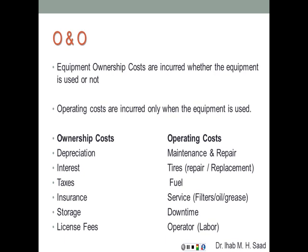Parts of ownership costs include depreciation, interest on a loan to purchase the equipment, taxes, insurance, storage, and license fees — all fixed regardless of whether the equipment works. Operating costs include maintenance and repair proportional to use, tires including repair or replacement, fuel, service items like filters, oils, and grease, downtime, and the operator's wages. The operator's cost is only charged when the equipment is being used — that's the major differentiation between ownership and operating costs.